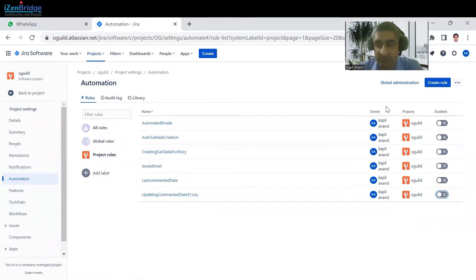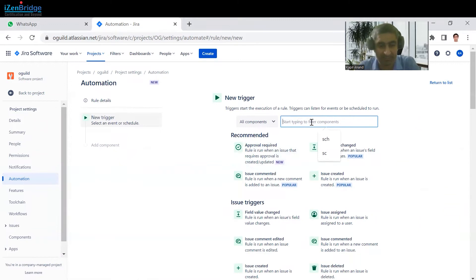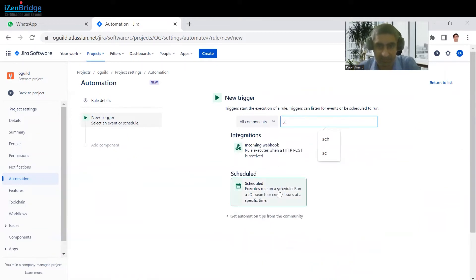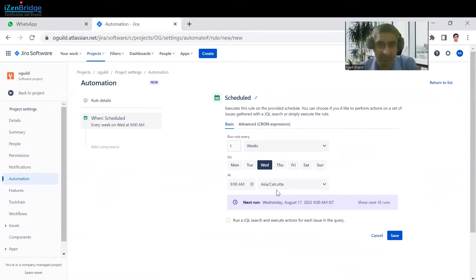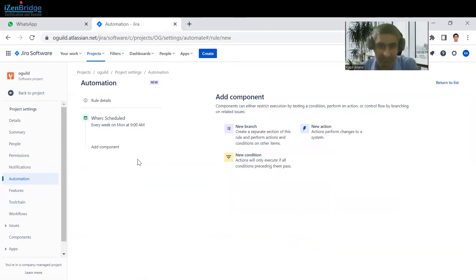Just click on the create rule button. We need a task to be created with the same description after every week, so that's a scheduled task. Let me search for the scheduled trigger. This is the schedule trigger — just click on that. After every week, we want to create that task. On which day? Suppose after every week we need to create it on Monday at morning time. Let's click on save.